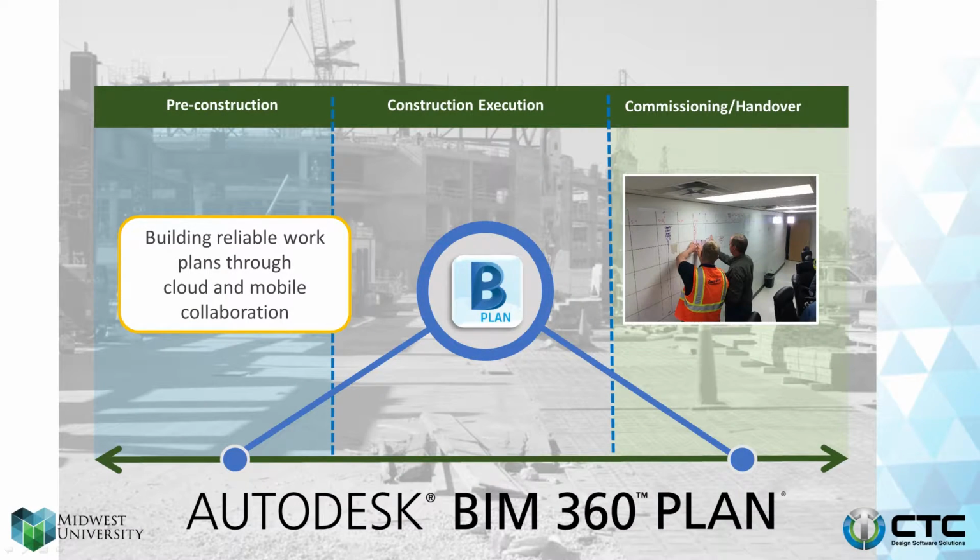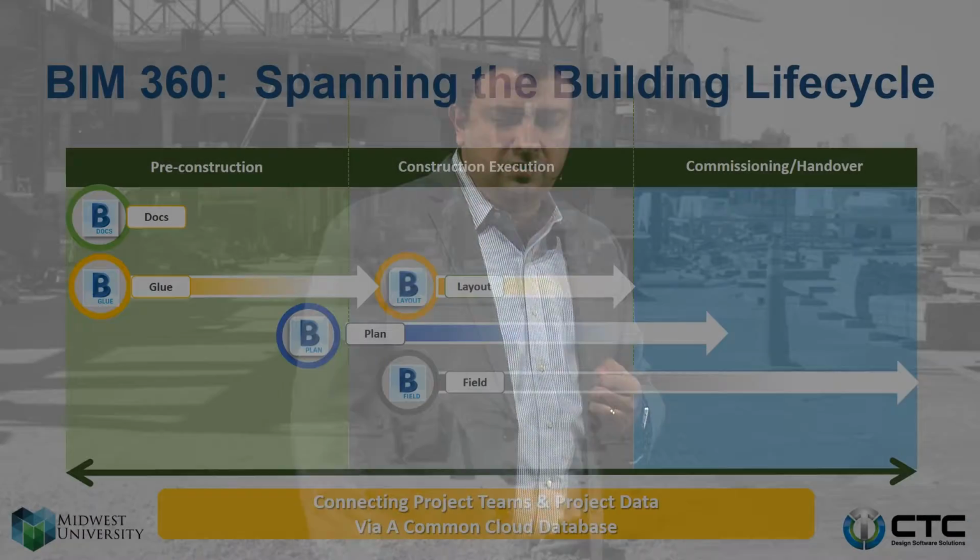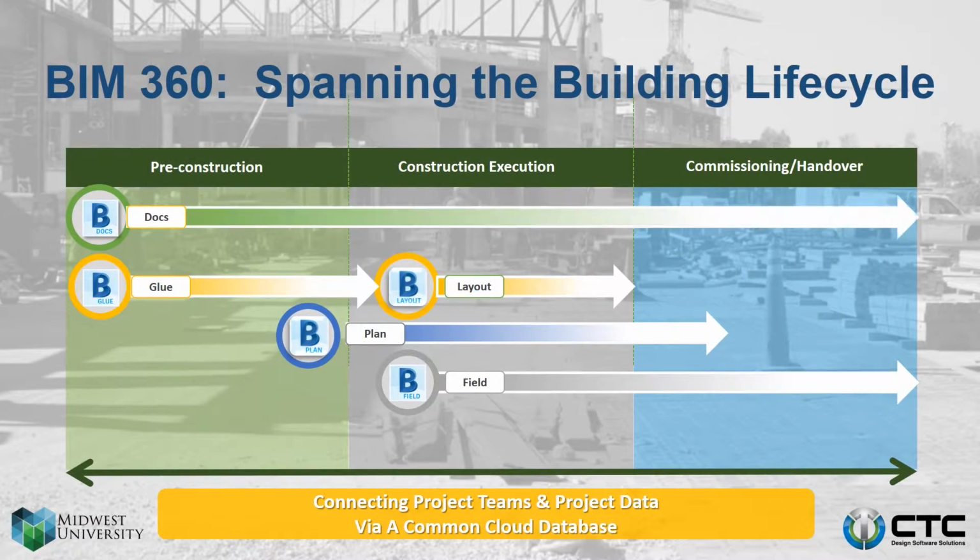With this, the pull planning doesn't remain only at the job site office, but it's actually used to capture information on what's happening out at the job site. If a task cannot be completed because somebody messed up or didn't complete their work, it could be easily reported back to the office through the live tool in the tablet. And same thing, allows us to get metrics.